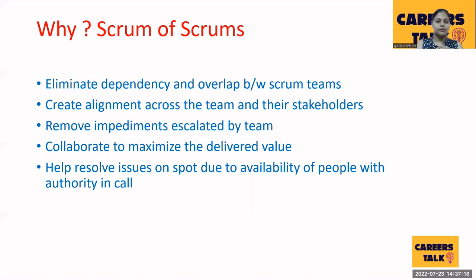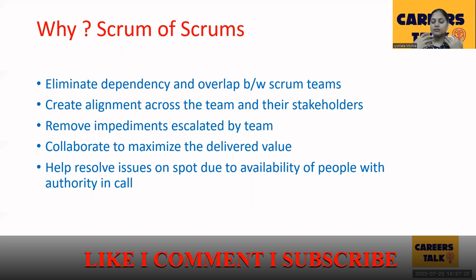You have to collaborate to maximize the delivered value. In the example I gave, you had to do a major upgrade, and because of compliance that upgrade has to take place. If a single team works on the analysis and verification, it might consume one or two weeks, or even your complete sprint work. So instead of doing that, check if dividing the work helps, check if there is automation in place, and check if certain things can be supported on weekends.